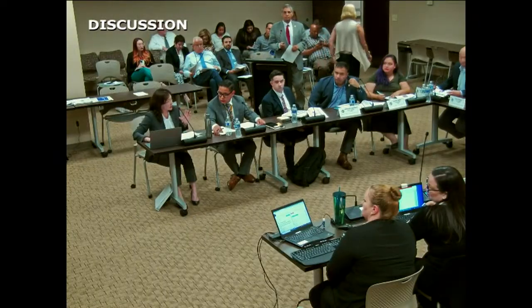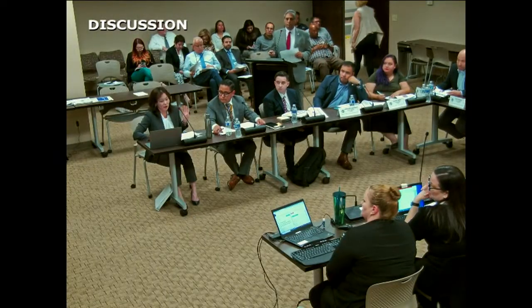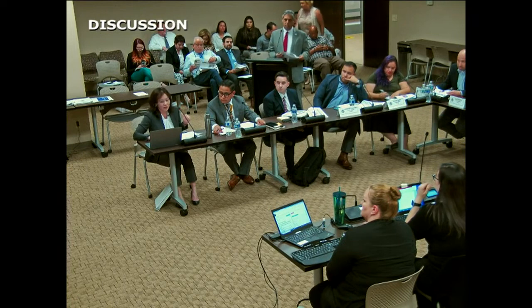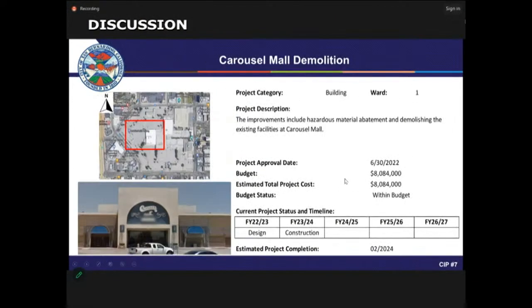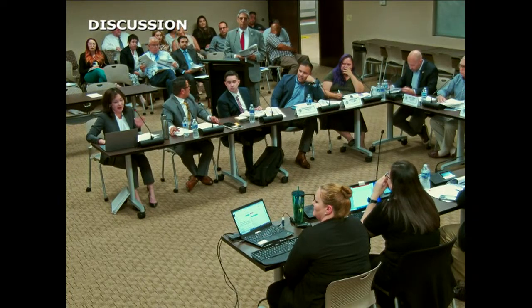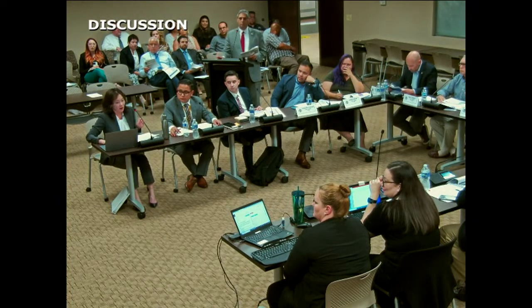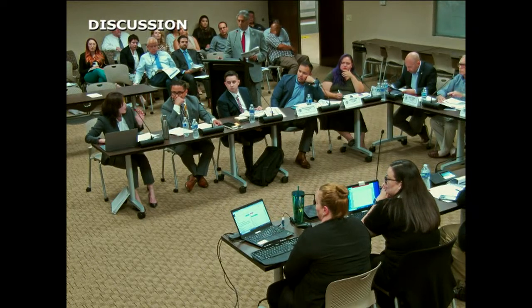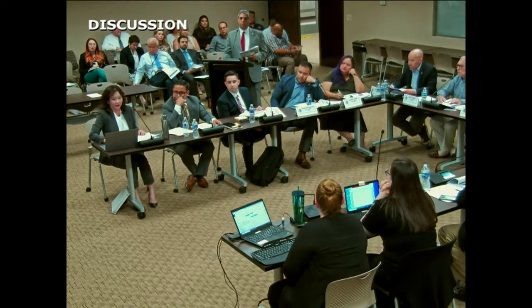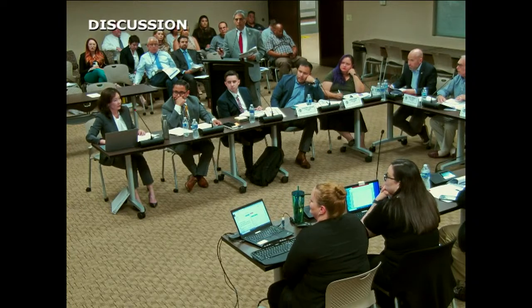If I can provide that, the funding for this has actually 4 sources. There's a donation fund, about $208,000, and then a CDBG, that's $658,000, and then a CDBG CV3 fund, about $371,000, and then lastly, a cultural fund, about $246,000. So we do keep track of the entire funding budget information.